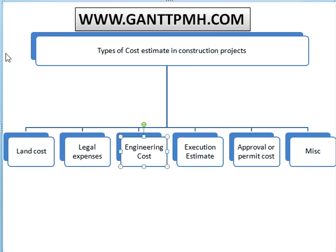In execution cost, we include manpower, machinery, and equipment cost. In manpower, we take project management, project engineers, labor, painters, blasters, machine operators, water supply, and many other things.